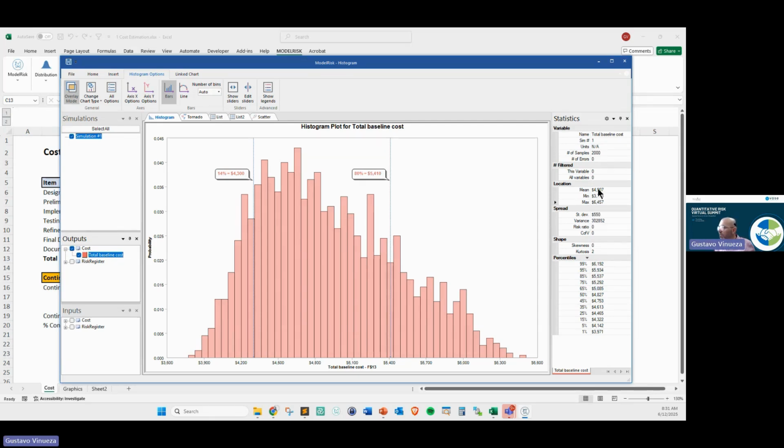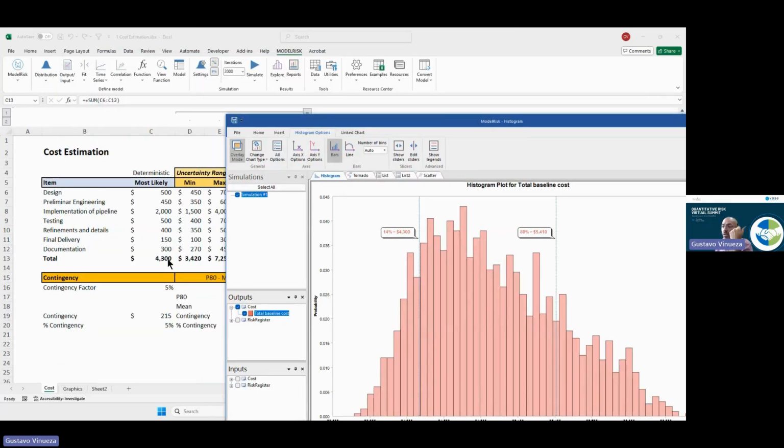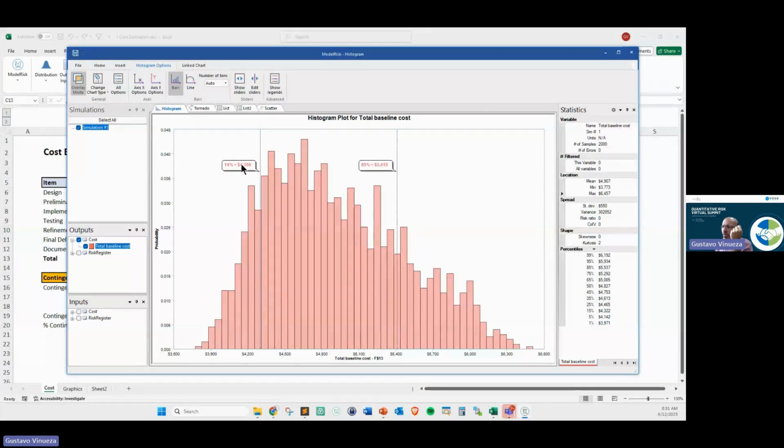So this is the situation. A couple of things that you gain with this. Now you know that the minimum and maximum are between 3.7 and 6.5 million, right? That's the first thing, you have a range. The range, you didn't have before. Secondly, you have the probability of reaching and surpassing or not your reference model, the 4.3 million.